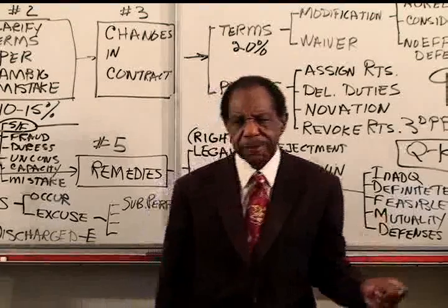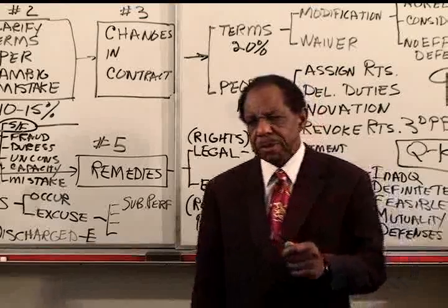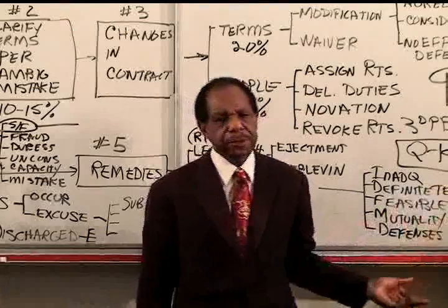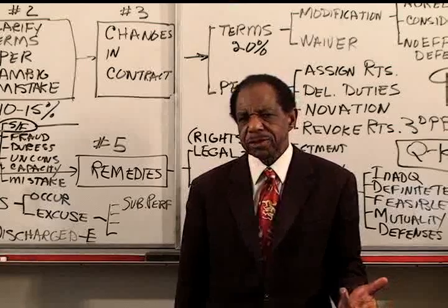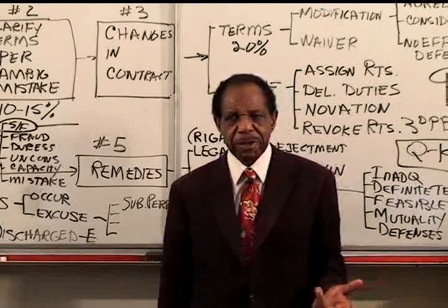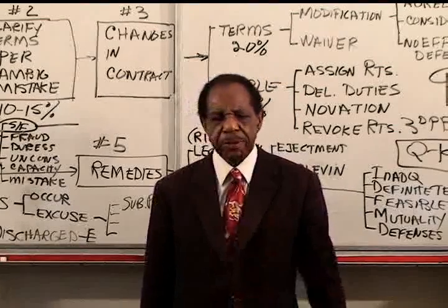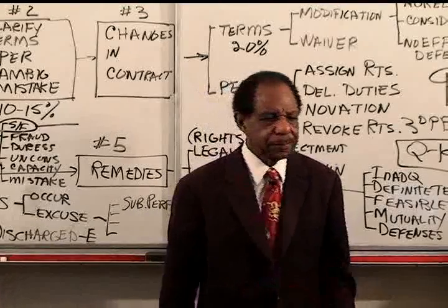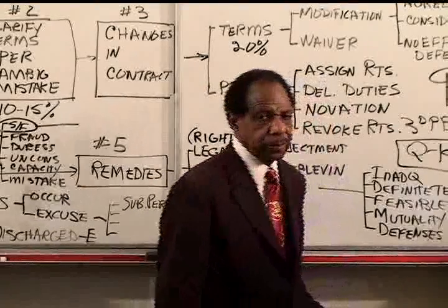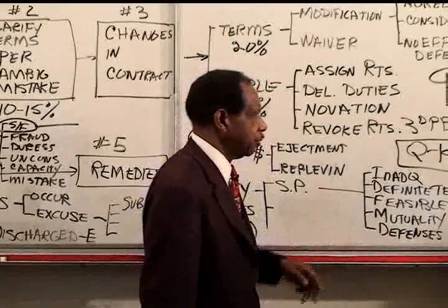Now here's a case where a buyer says, okay, seller, you can have the other 30 days. And now seller is relying. And so this could be treated as a waiver, that buyer has waived his rights to have the thing finished on February 15th, and now has moved the date to March 15th because seller has relied on this promise that we can have an extra 30 days.